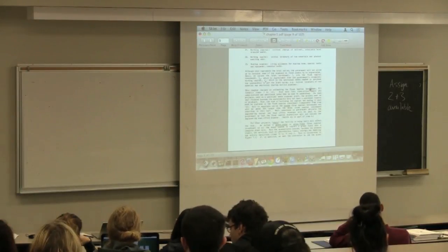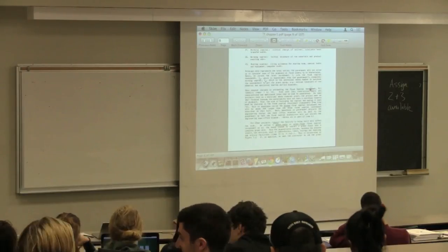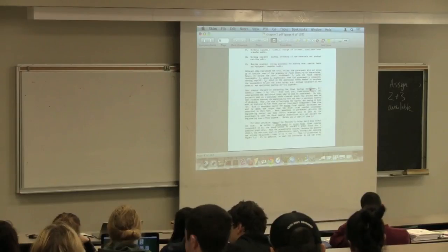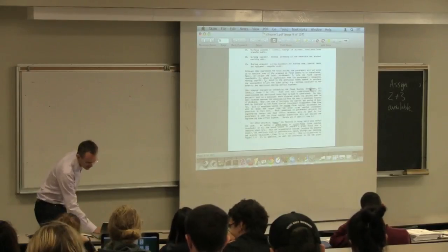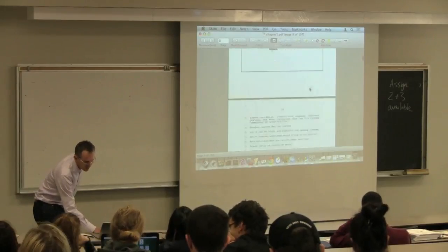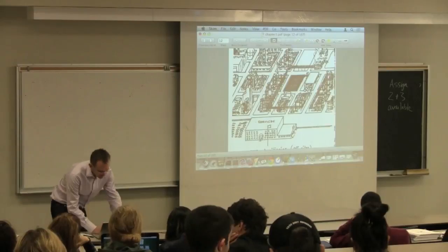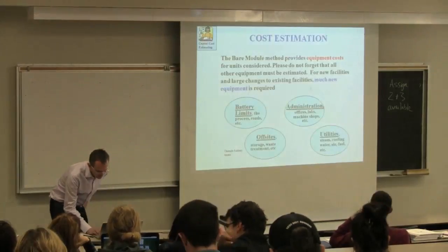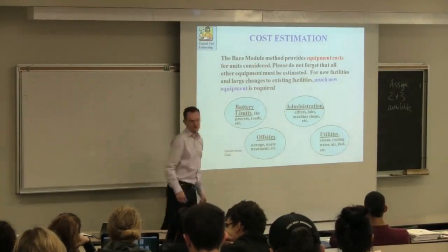Now, obviously, if you're at an existing site where a lot of that is already in place, then your NPV does not need to take into account building, for example, the laboratory, because that likely exists already. So in every case, you would just simply take the incremental costs. But this list is nice because it's giving you the base case, when you're starting from scratch, of items to consider. So please, I strongly recommend you read through this list. It's right at the start of chapter one, and it goes on for about 4 pages of description and illustration over there. So that's essentially a summary of what this slide is talking about.